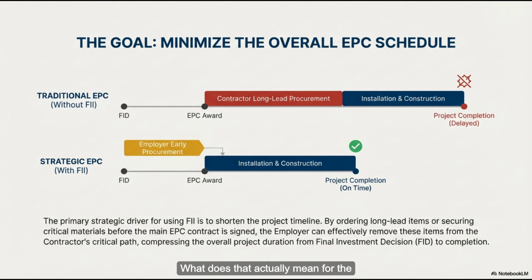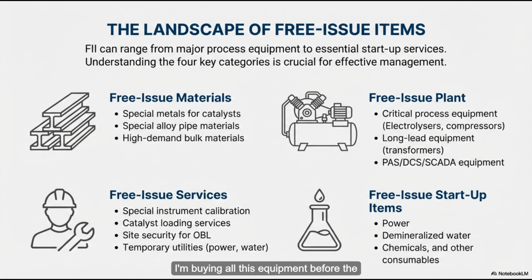What does that actually mean for the person signing the checks? FID is the point of no return. It's the moment the board says, yes, we are officially funding this, here is the $1 billion. Before FID, the project is just an idea on a PowerPoint slide. Wait a minute. So if I'm doing early procurement to beat the schedule, I'm buying all this equipment before the final investment decision. Yes. You are spending millions of dollars on hardware for a project that technically doesn't exist yet.